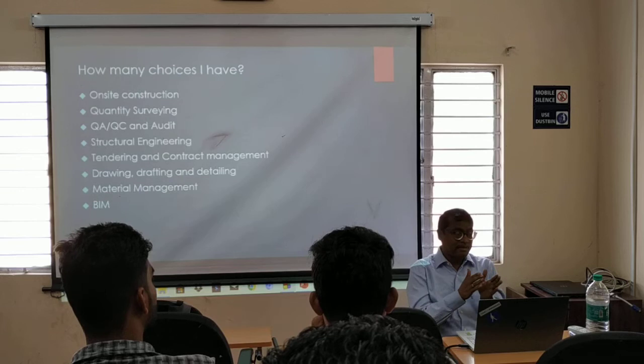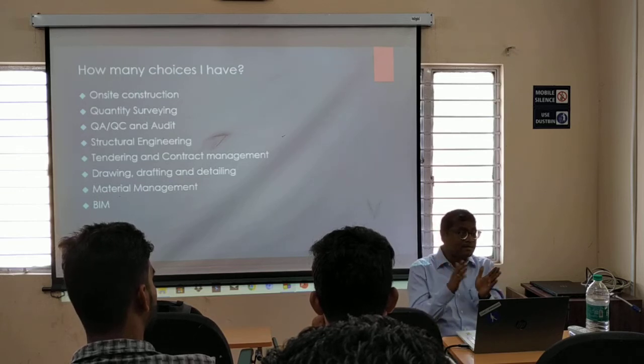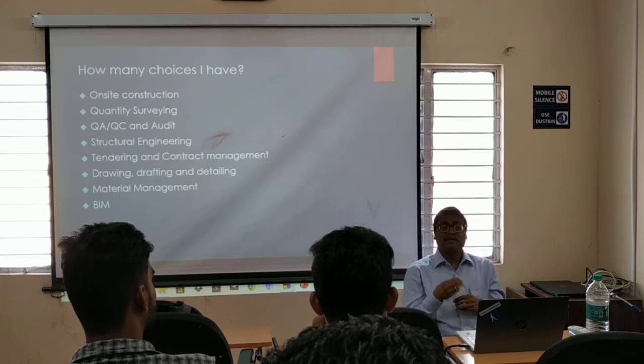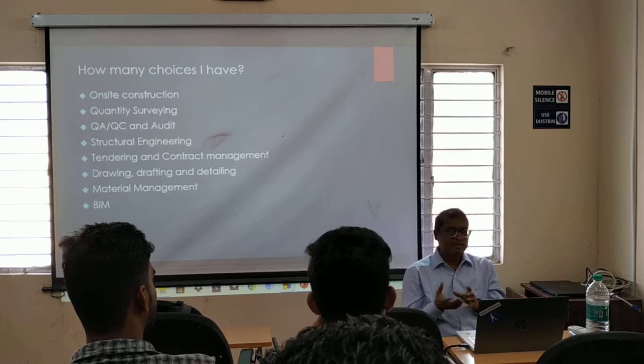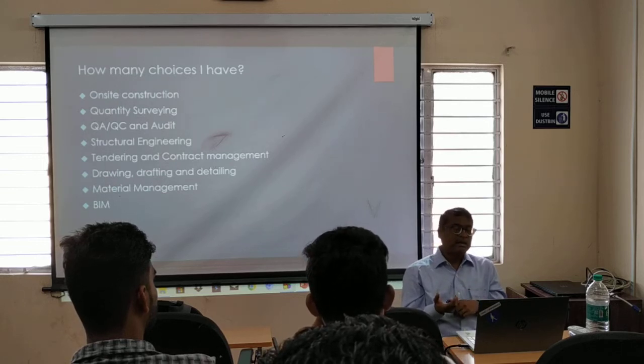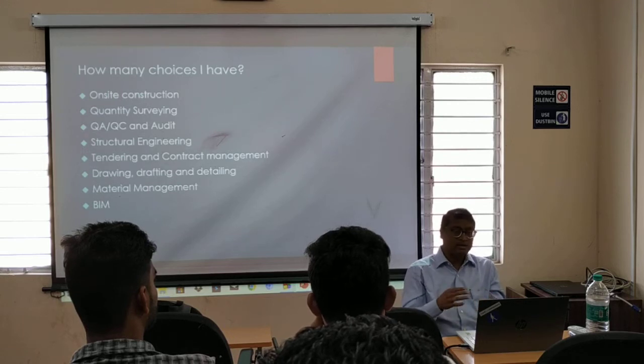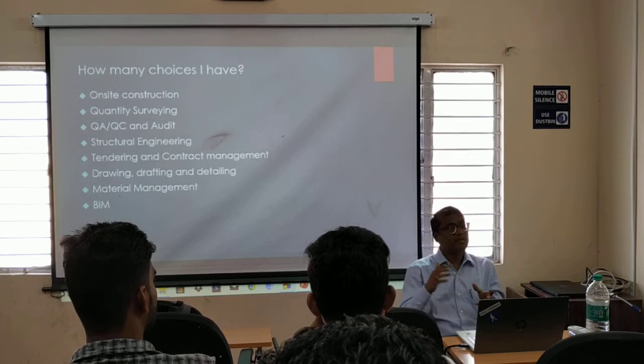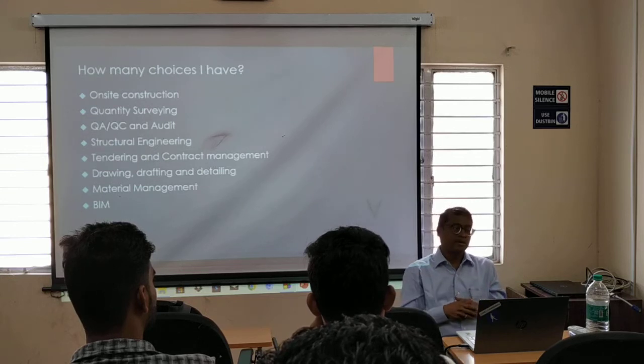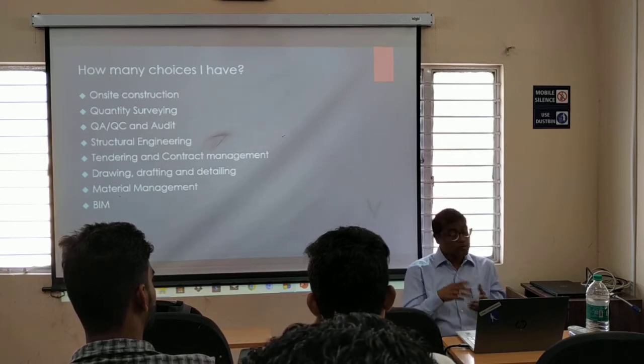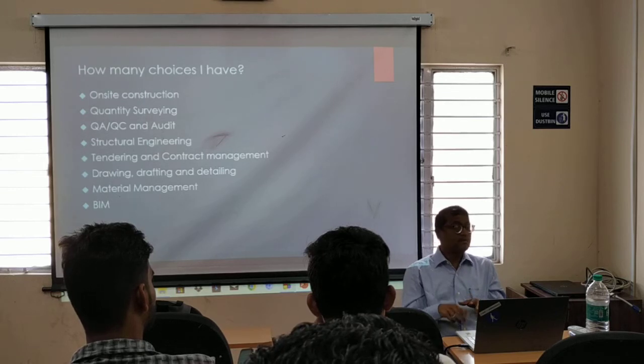So that is why the LOD, the level of development, is important in BIM. And there is something called the depth of development. Depth of development is 3D, 4D, 5D, 6D. Up to 6D we have gone. 3D is length, breadth and depth. 4D is time. When we include schedule into the BIM modeling, the fourth dimension is included.